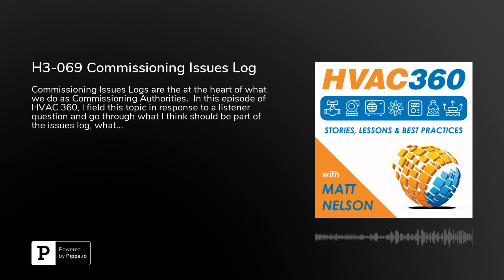So one thing that I do in my sequential numbering is list the issues by system and then give that system a specific starting letter. Does that get a little complicated when you're dealing with electrical or technology? Pick whatever makes sense to you. But that's just my 2 cents as far as having a sequential numbering system for your issues log.